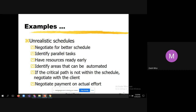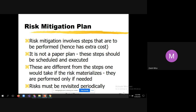Identify areas that can be automated — in a project, not everything can be automated, so you have to identify what can be. If the critical path is not within the schedule, negotiate with the client. Once again, if the schedule is unrealistic or due to mid-project changes, you have to convince the client and negotiate. Also negotiate payment on actual effort when implementing new requirements.